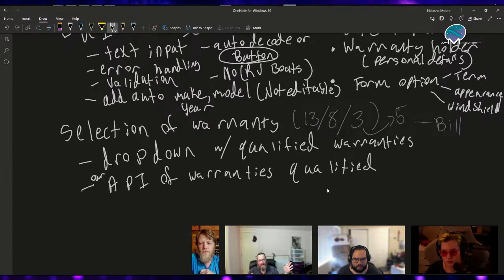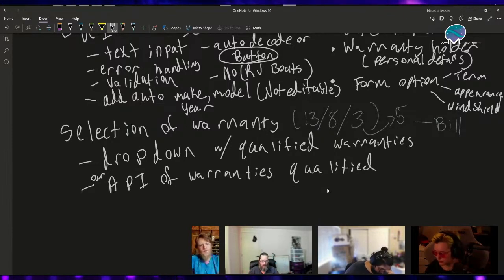Typically, the way I've worked in the past, any number above 8 means that we didn't decompose it enough. So when Tasha gave the 13, what that has meant to me in the past is that this task is super complicated, and we probably didn't decompose it down enough. Okay. So typically any given task you want to be able to fit into one sprint. That's not a have to, because you can obviously carry stuff over, but typically you want to break stuff down into bite-sized chunks.